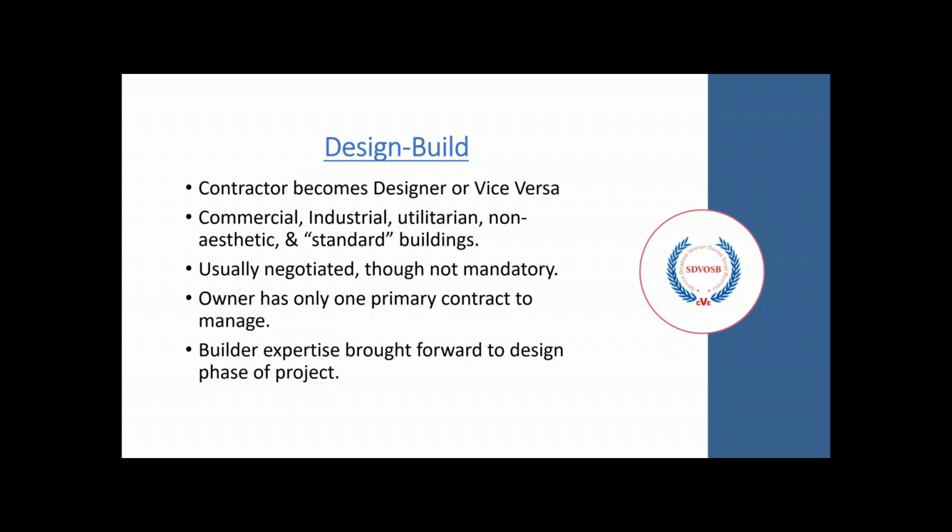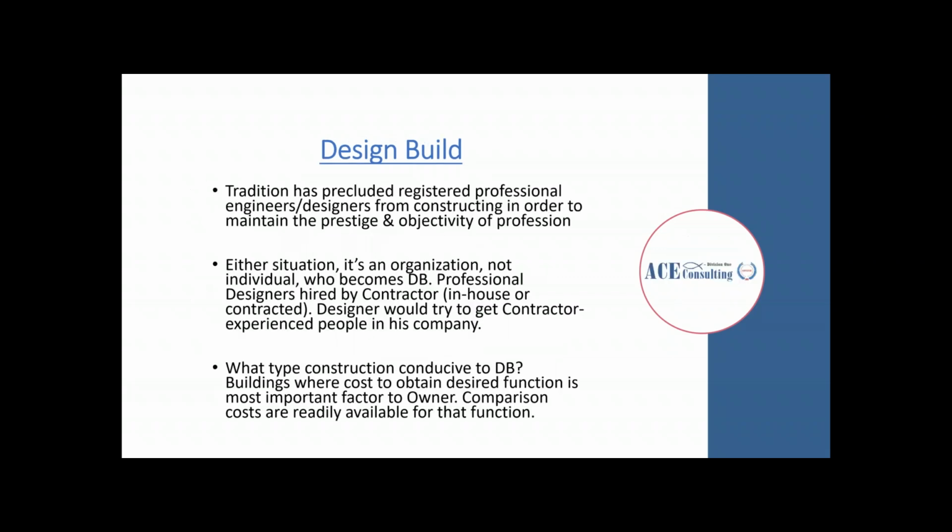A benefit to the owner is that they only have one primary contract to manage. They only have a contract with a single design-build firm. Traditionally, there hasn't been a large mix of the design and the construction world. These design-build firms are starting to break that mold.